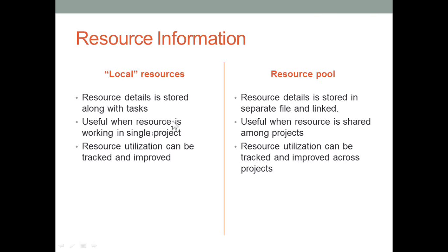Towards your right, you have a new term we are using today called resource pool. A resource pool is quite similar to a local resource. The only difference is the resource details are stored in a separate file and it is linked to other projects where it is referred to. The benefit of having a resource pool is if you have a group of resources that are shared between multiple projects and you want to maintain their cost and calendar information, then resource pool would be quite useful. The third important benefit you have about resource pool is the utilization and their optimization can be done to a much larger extent compared to local resources.